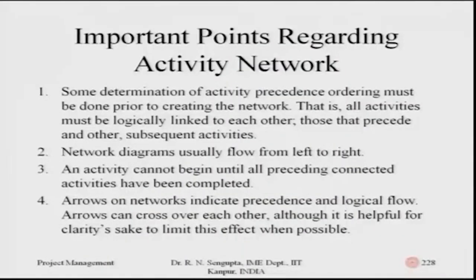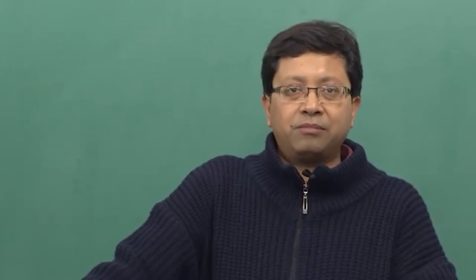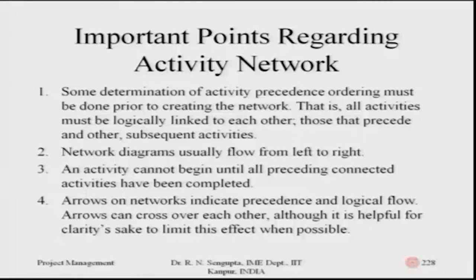Some important points regarding activity network: a determination of activity precedence ordering must be done prior to creating the network. You need to understand which job comes first, which job comes second, whether there is a sequence of jobs which has to be followed, or whether they can run concurrently, or whether there should be a delay between two activities and jobs. This should be well known to the project management team who are basically trying to implement the project. All activities must be logically linked to each other.